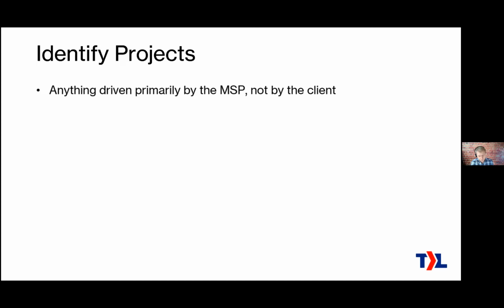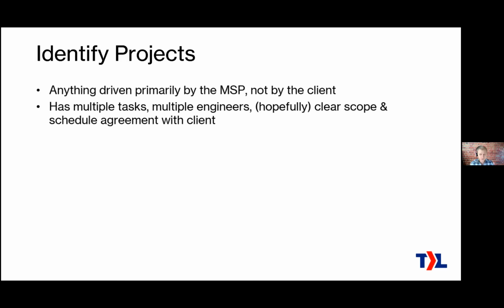Projects, your customer wants a big problem solved, and they're looking to you not just for how to technically solve it, but also how to get it solved. Hey, we're going to pay you to run the project too. It's going to have multiple tasks, more likely than not multiple engineers working on it. And you definitely need a clear scope and an agreement about the schedule and the cost with the client.